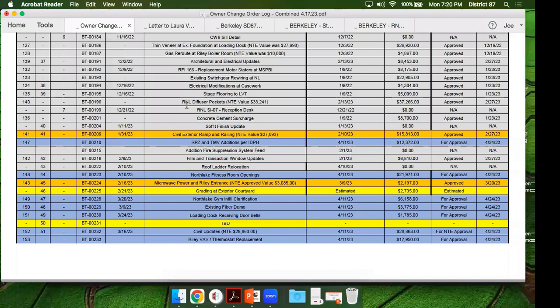In the addition, we are installing two new fiber lines to serve as a form of, what's the word? Redundancy. Thank you. Because we do have those two new lines going in, this existing fiber can be demolished. But we cannot do that until we have the two new fiber lines installed and ready to go, which won't happen until the end of the summer.